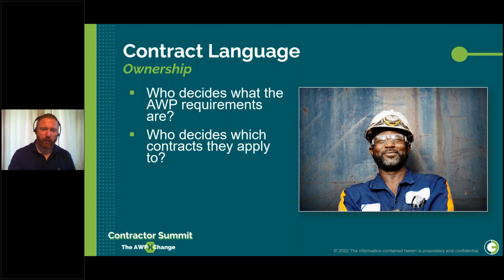Should the general mechanical contractor, as another example, enforce flow down conditions about AWP into the contract? So the owner has said, you must do AWP. Is that primary contractor going to push those down to some of its subs? What that contractor should usually be looking at there, again, is based on things like risk and criticality for the work that sub is performing.